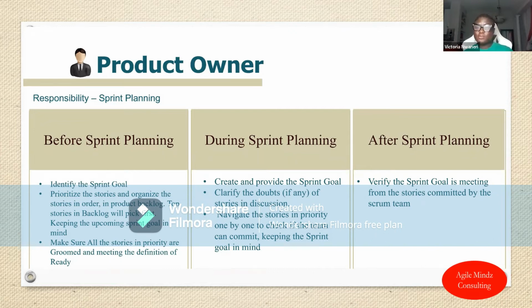And typically during sprint planning, it's kind of a fast version of the backlog refinement meeting, of what I called it, right? So we go through the stories once again on a high level based on our capacity and velocity, right? We go through those stories, and if those stories need further clarity, the product owner is there to provide further clarity, right?